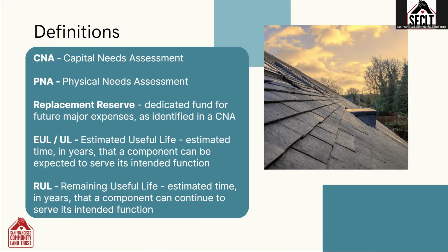You may hear me mention replacement reserves throughout this session. Replacement reserves is a dedicated fund for future major expenses as identified in the CNA. This account is often required by lenders, and it's where owners will set aside funds over time for major expenses, like replacing a roof. A CNA is going to identify these major expenses, and then a reserve study will calculate how much money is needed in your replacement reserve at any given time so that you can afford those expenses.